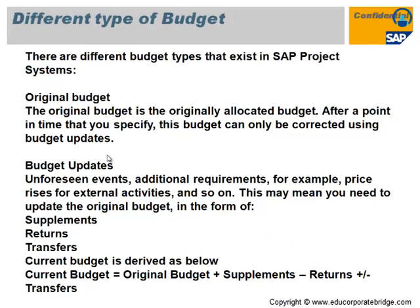The different budget types available in SAP Project System are: original budget — the initial upload of budget in the system; supplementary budget — added when funds are exhausted during project execution; return budget — when balance funds remain after project or WBS completion; and budget transfer — moving budget from one WBS to another. The current budget formula is: Current Budget = Original Budget + Supplementary − Return +/− Transfer.